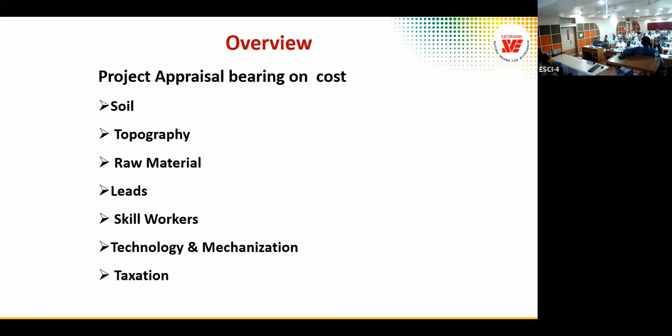I mean, what is the cost per labor? Cost of the LELA, we call labor installation and labor accommodation, labor elements. It is there in the SSR, but not adequate. Nowadays, if you follow all these labor laws and create a labor camp, the cost per head of labor camp is 130 rupees per day. 130 rupees per day, per person.